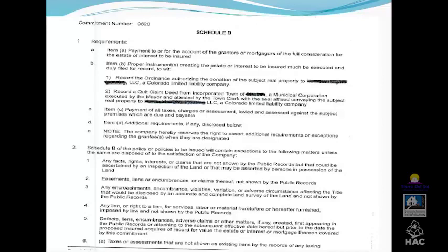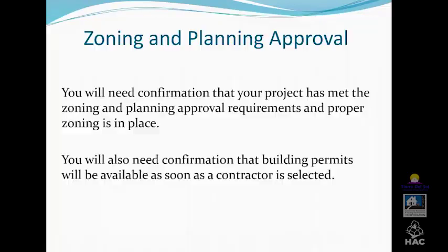And the engineer and the architect work closely with the city or county to complete the process for obtaining the final approvals. They get the drawings together, they get the utility plans together, they work with the local public works department, and when they are done, there will likely be off-site requirements, and maybe not, but there very well could be off-site requirements, meaning there are requirements to get the utilities to the property or the roads, the streets, something, that are not on site.